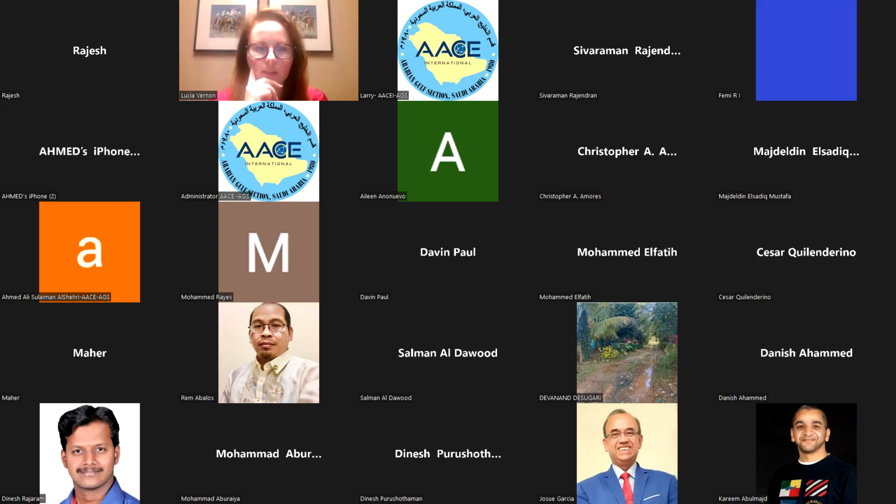We are using Primavera, which is commonly used because it's a collection of the data, and then it's just a simple Excel format which we use to present the delay analysis. The new way of presenting is, for example, we are doing movies for when the clients see the major issue. That is mixing delay analysis with BIM models, which is very good to solve the problem or support negotiation. Then we use the CDS model for the disruption claim. So it depends on what is required, and on many factors like delay analysis selection as well. Everything that is useful and will bring an amicable settlement is okay.